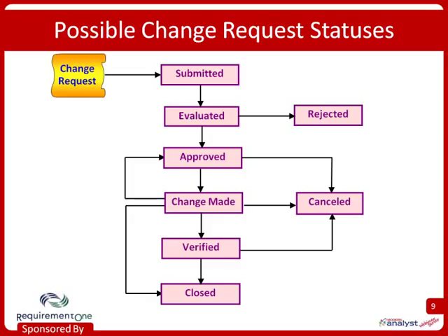Now, you have to be a little careful with something like this, not to try to define too many different statuses at once. I once saw somebody configuring their new change control tool when I was at a client site, and they set up more than 20 statuses for change requests. So make this diagram more than twice as many boxes. And even if they're all plausible statuses, some of them were just transient things that you would change from A to B and then immediately B to C, and no one's going to use them all. It's just too complicated. So something like I've shown here, I think, gives you a set of statuses that's probably enough in most cases to handle typical changes.